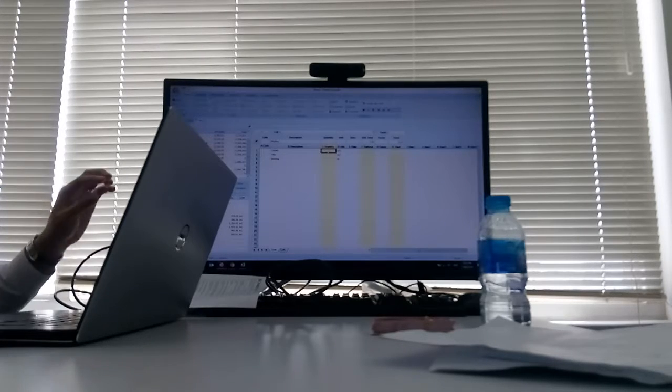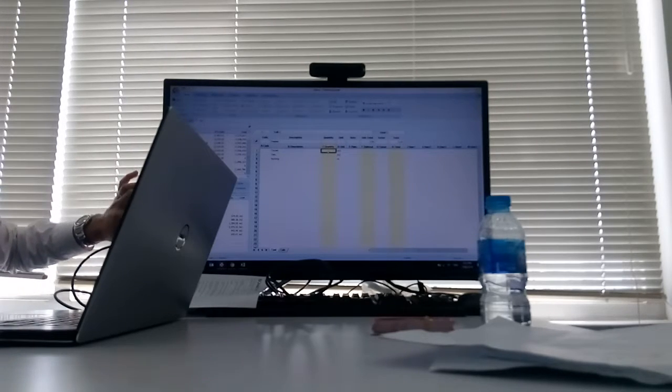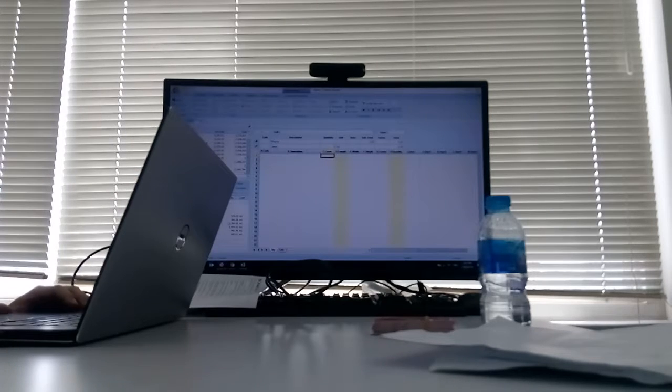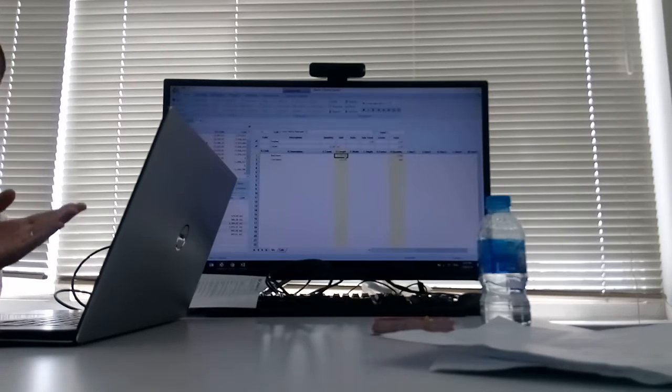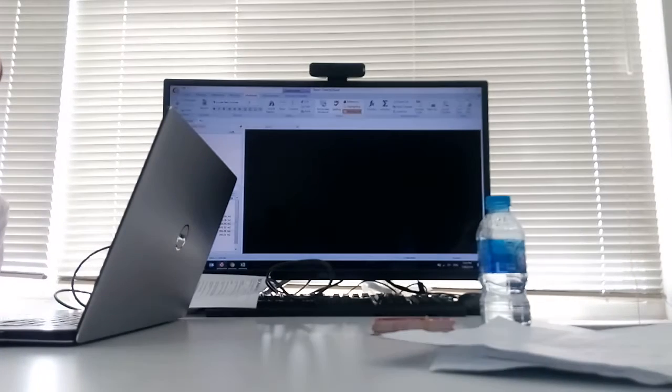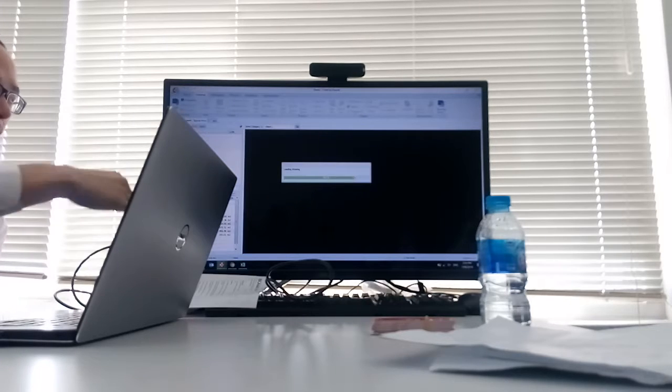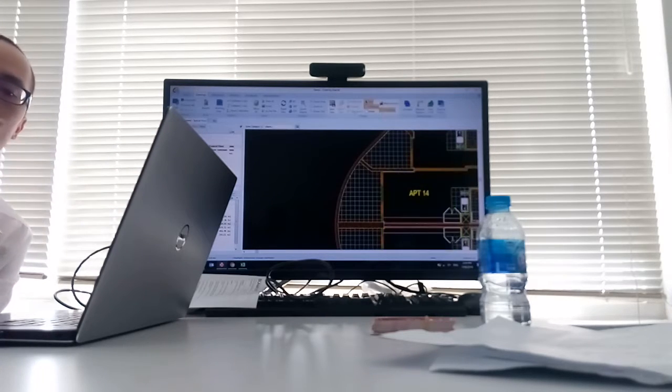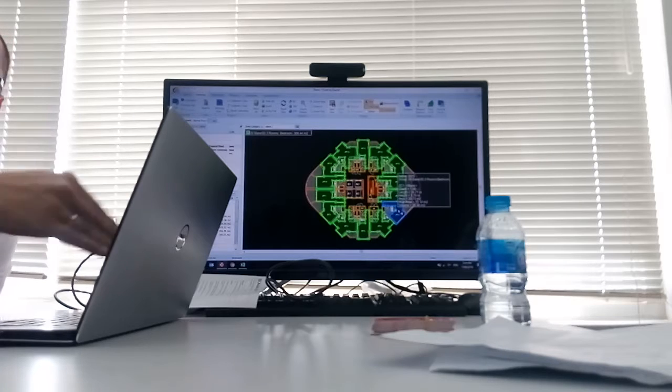On the quantity, because we did the measurement, it's down here. To bring it inside is as easy as this: bedroom, corridor, you just click and drop it inside. Once you drop it inside, it will show in green color. This green color is the mapping to the drawing. So if you have any query about this quantity, there is a button called show source. You click that, the software will search through your drawing file from where you did this measurement, and list everything up.